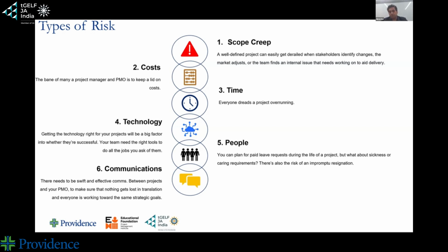If scope creep happens, you go back to the drawing board and say, you know what, maybe I will allow scope creep. What I mean by allow scope creep is I will go back and look at the initial agreement. I will look at maybe we need to do things differently. It may cost us more, or it may take less time, or use a different technology. For the betterment of the delivery of the project or the product, I will allow it. And then we will change our statement of work and our agreement with the stakeholders.